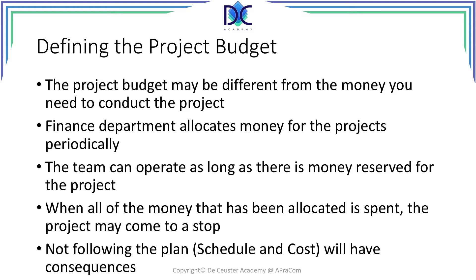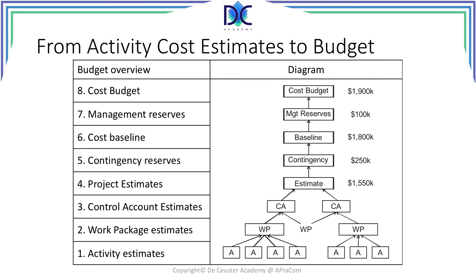As long as you still have money in your allocated budget you can continue to work. When all that money is spent, you may have to stop working on the project. Of course, when you're not following the planned schedule and cost, it may be a problem — you may need the money faster when you're ahead of schedule, or you may need more money when you're over budget. So it's a very important element to understand how the project budget looks.